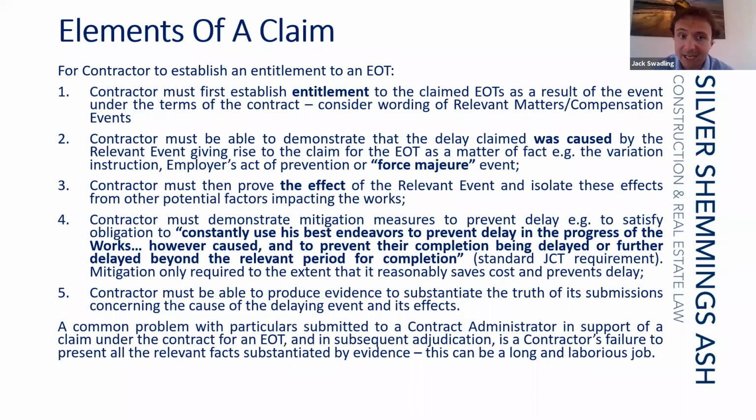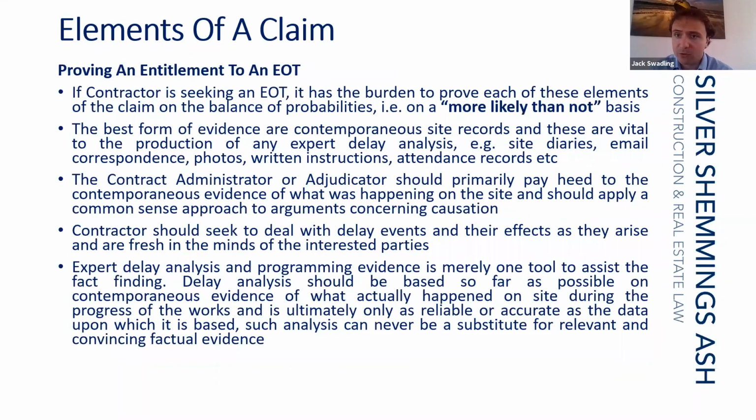So that said, for the claim for the extension of time, the burden on the contractor is only proving its entitlement on a more likely than not basis. So on the balance of probabilities. This doesn't mean that you need to prove every fact. You just have to show that the facts presented in the claim for the extension of time are more likely than not true. The best form of evidence is contemporaneous site evidence and records, so site diaries, timesheets, email correspondence,